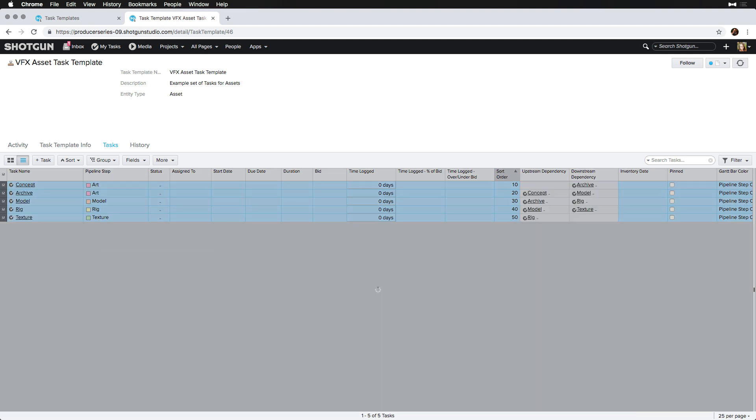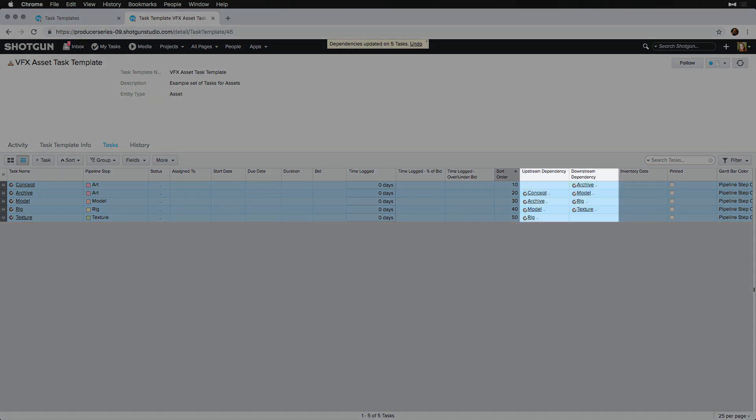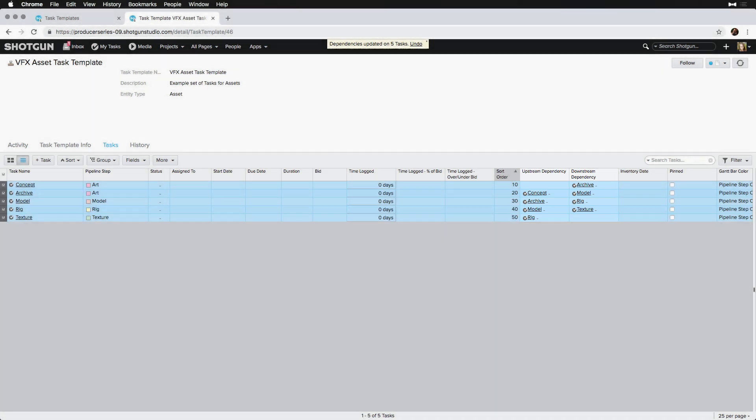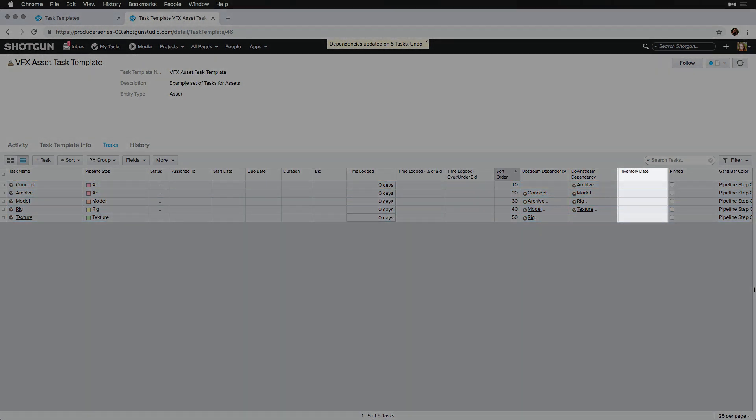Then, we'll notice that all of the upstream and downstream dependency fields are filled in correctly. The inventory date shows the date a task can be started based on upstream dependencies.